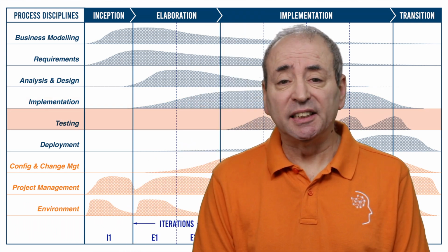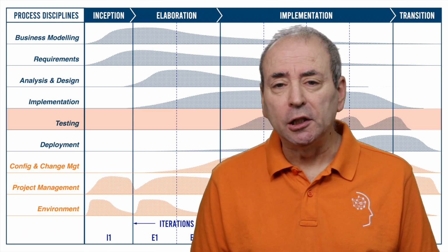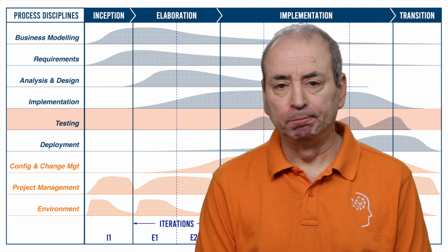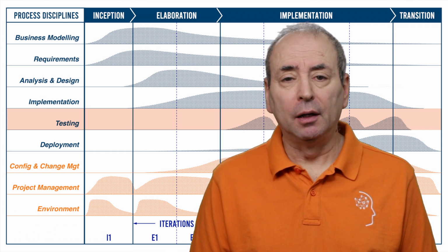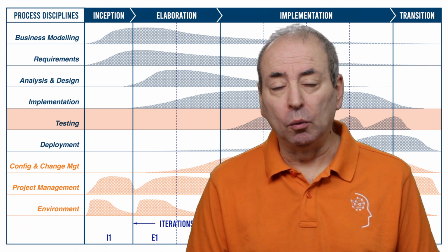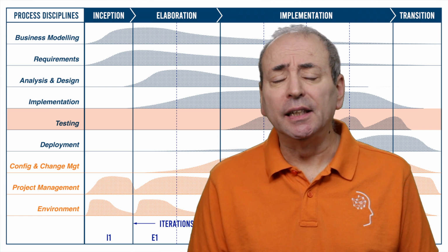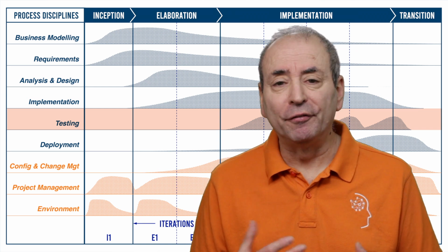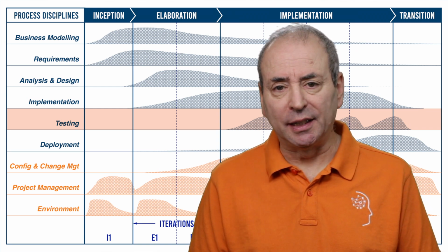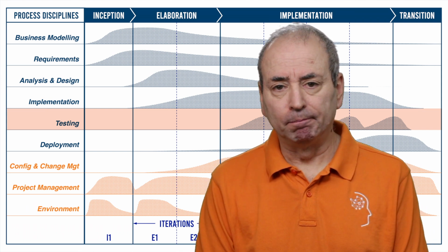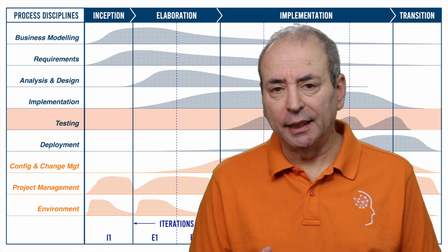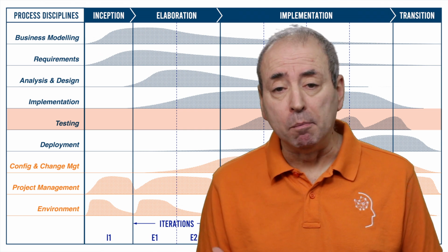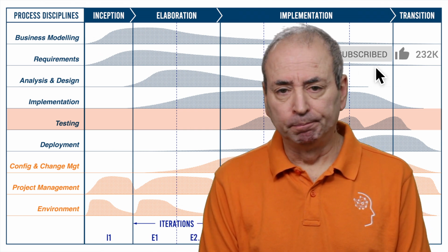The fifth process is testing. The objective of testing is to ensure the proper integration of all of the components and the working of the full system. It's where we aim to uncover and then resolve any defects in the work that we've done. Crucially, testing doesn't only happen in some testing phase. We start testing during the implementation phase, and then final end-to-end and user acceptance testing happens during the transition stage. Throughout the RUP process, we're testing for reliability, functionality, application management, and system performance.